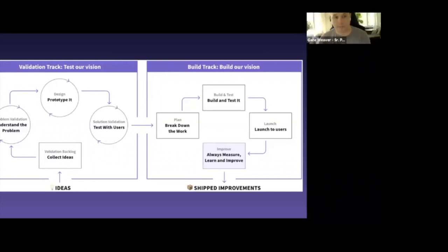I would love to. I think now that you have a high level understanding of our product development flow, let's talk about how we manage that process in GitLab. While we continuously deliver improvements to GitLab.com, our planning cadence centers around our monthly release to our self-managed customers. And we've shipped a new release to GitLab on the 22nd of every month for the past 119 consecutive months.